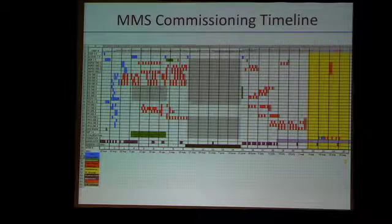What is that gray period? Well, we're on an eclipse break, as we call it. When the government shutdown happened, remember the government shutdown? That shutdown developed into MMS as well. And our launch was going to be last October. And our commissioning, of course, was just going to go with no break. But when our launch was delayed until March, that put our commissioning right over a period of very long eclipses. And whenever there are long eclipses on a satellite, you very often can't run every instrument. And so during this period of time, we're on break and coming to meetings.